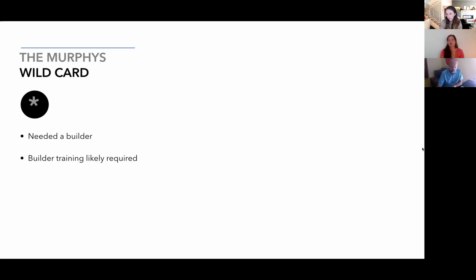So both builders that we identified and spoke to at that time couldn't start a new project until roughly 8 months from when we were talking. So that was beyond the timeline of when these particular clients, the Murphys, wanted to be completed with their home.